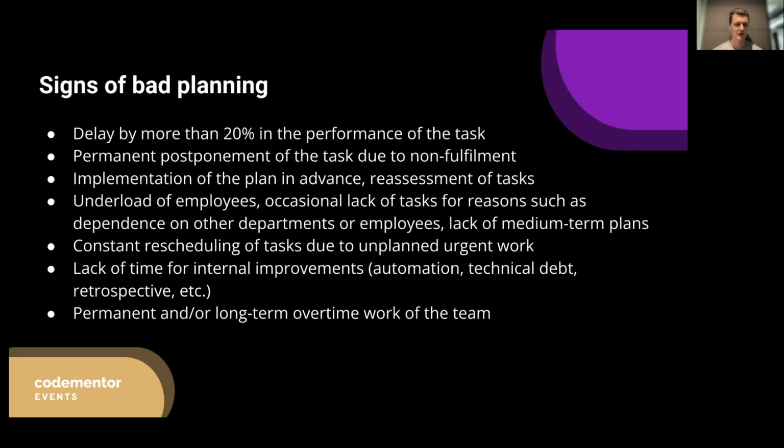Lack of time for internal improvements. This is a pretty common thing for teams where management or a project manager or product manager forces you to implement new features more and more and more, and you completely forget about bug fixes, retrospectives, technical debt, and so on. It could lead to a situation where at some point the team will need to allocate a significant amount of time to support of the project, which correlates with product development, but it's not the main purpose of any development team, because if you spend 30% of time on support, that means that your product is not in a great state, and you definitely need to address it to solve this issue.